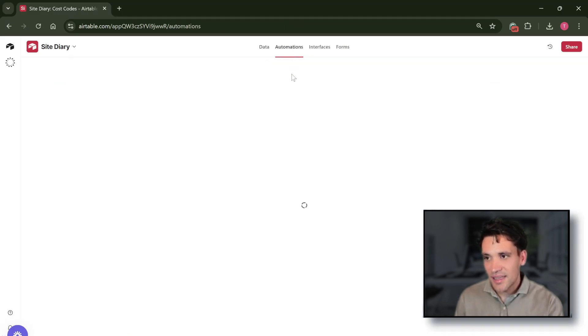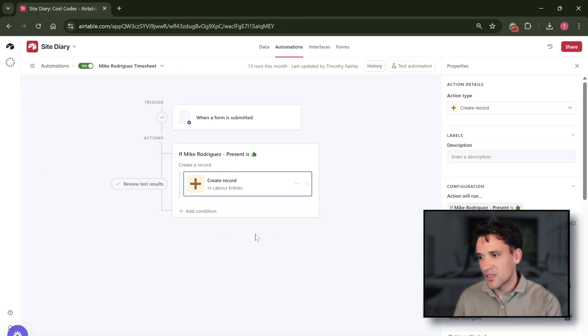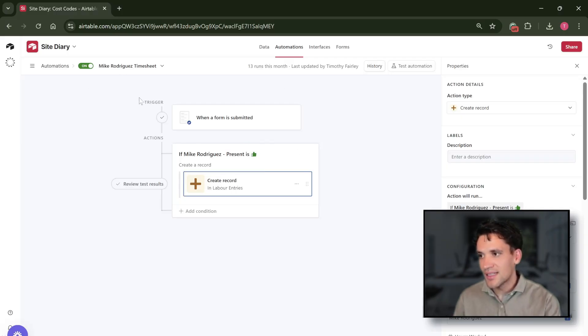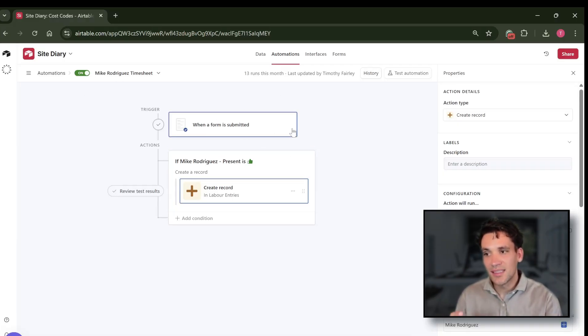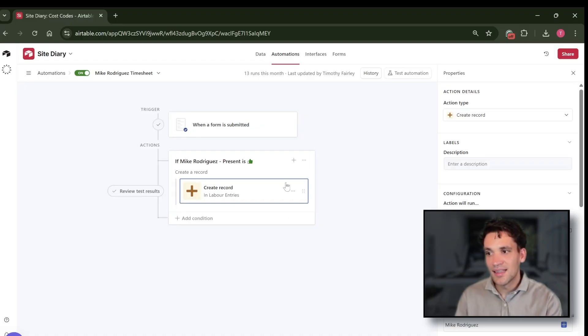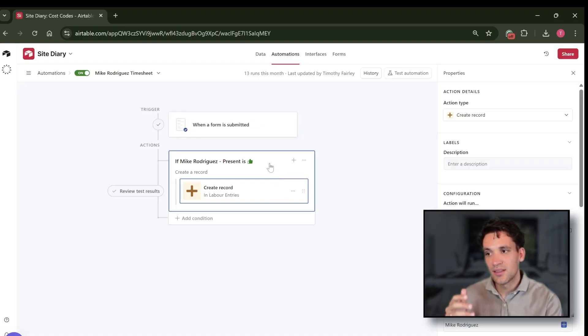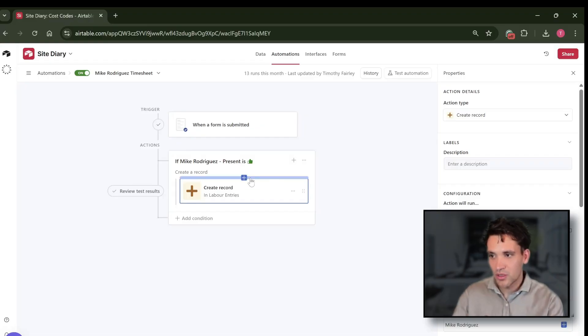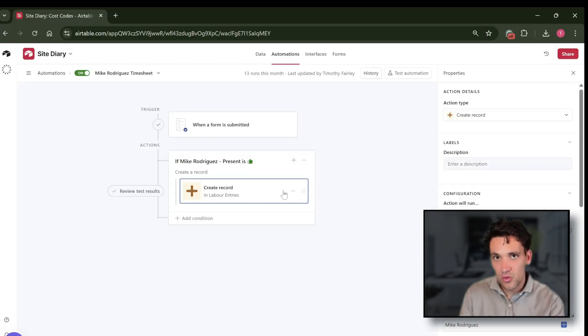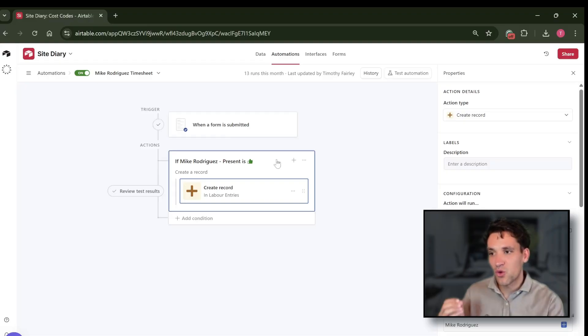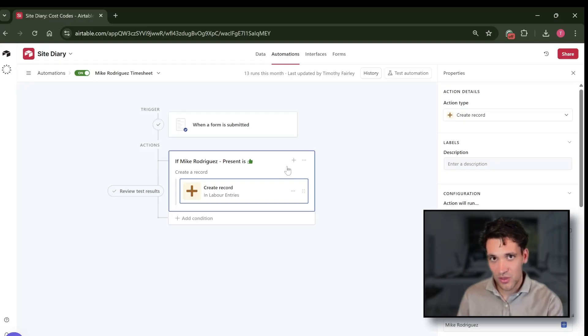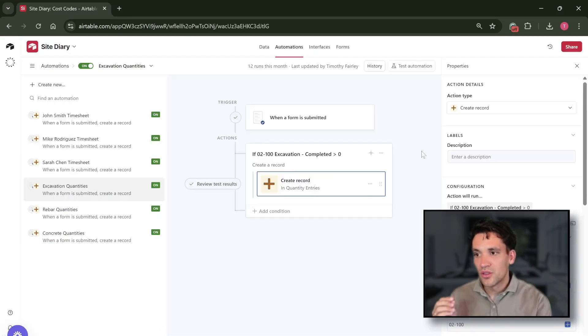To do that in Airtable we use a tool called automations. So an automation is simply when a specific action happens, so when a form is submitted, there's then a process where through an automation we take the hours that Mike worked for example and we create a new record based on this so we've got a clean entry of all the different labor records. We can do this for the quantities as well.